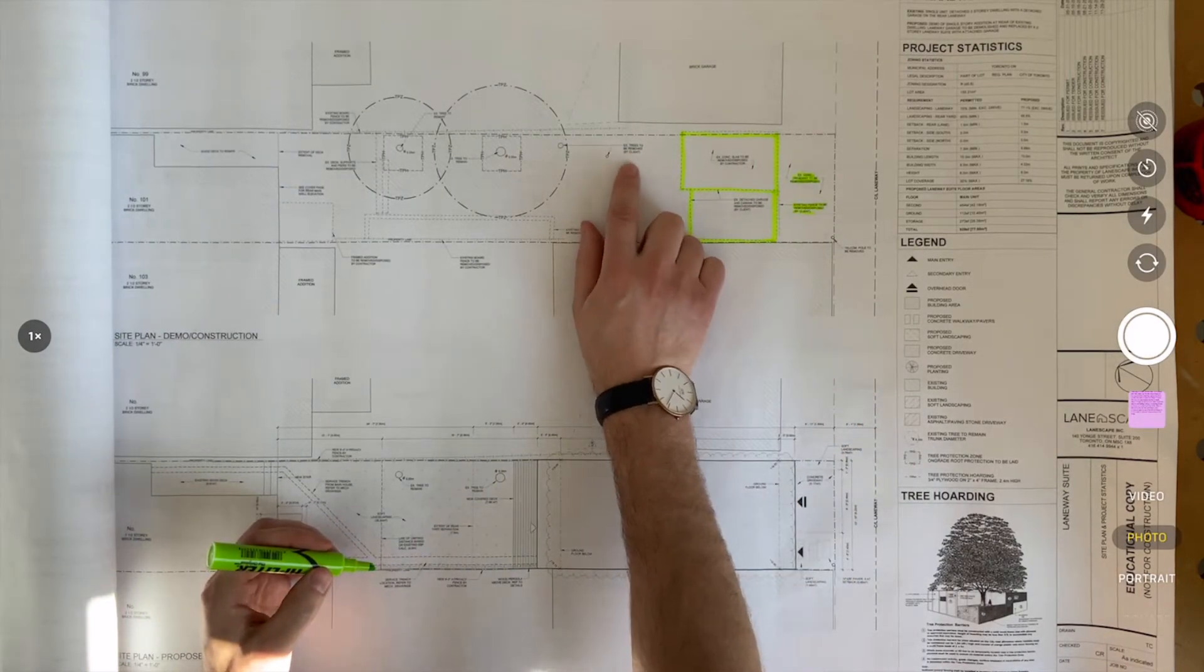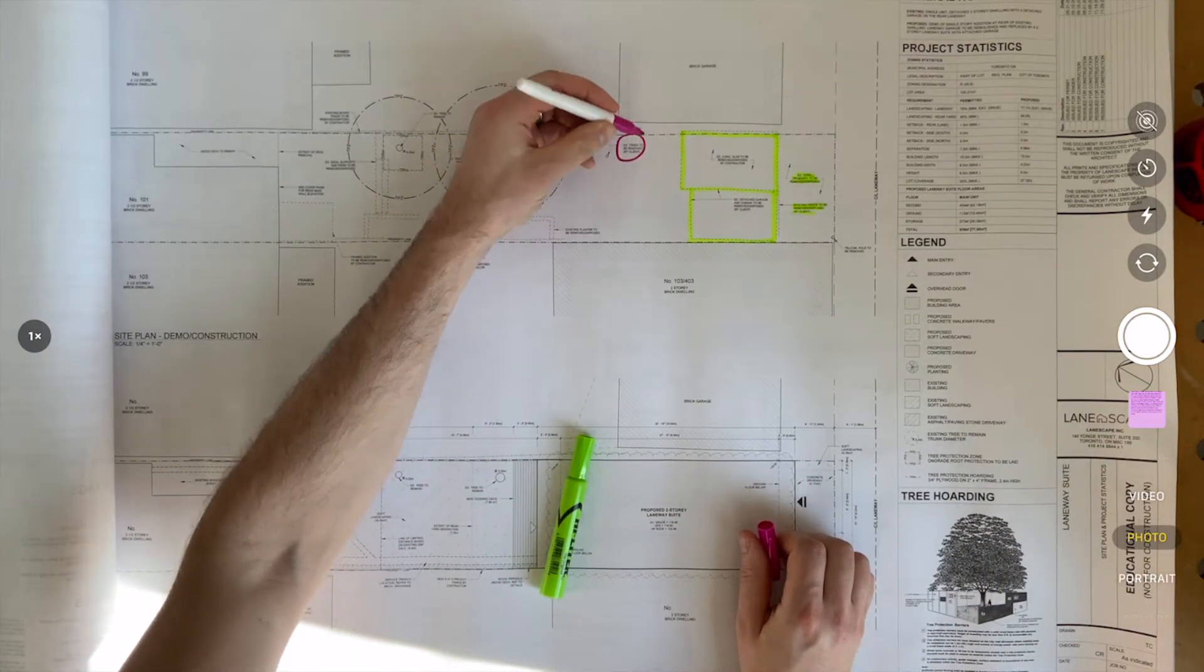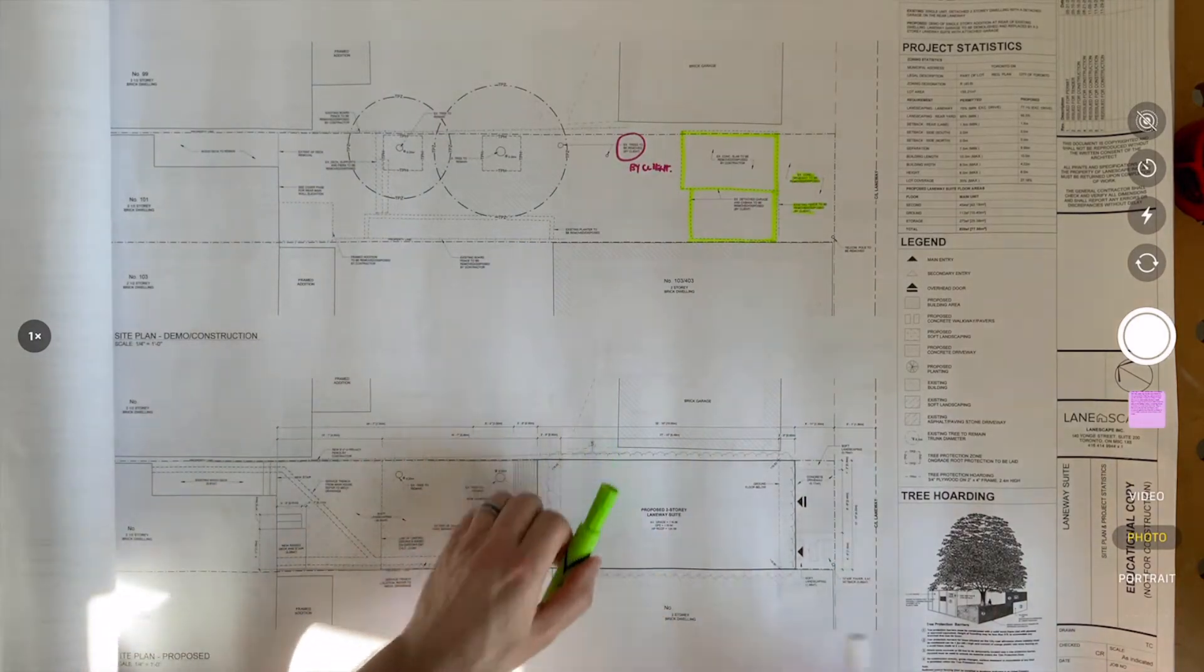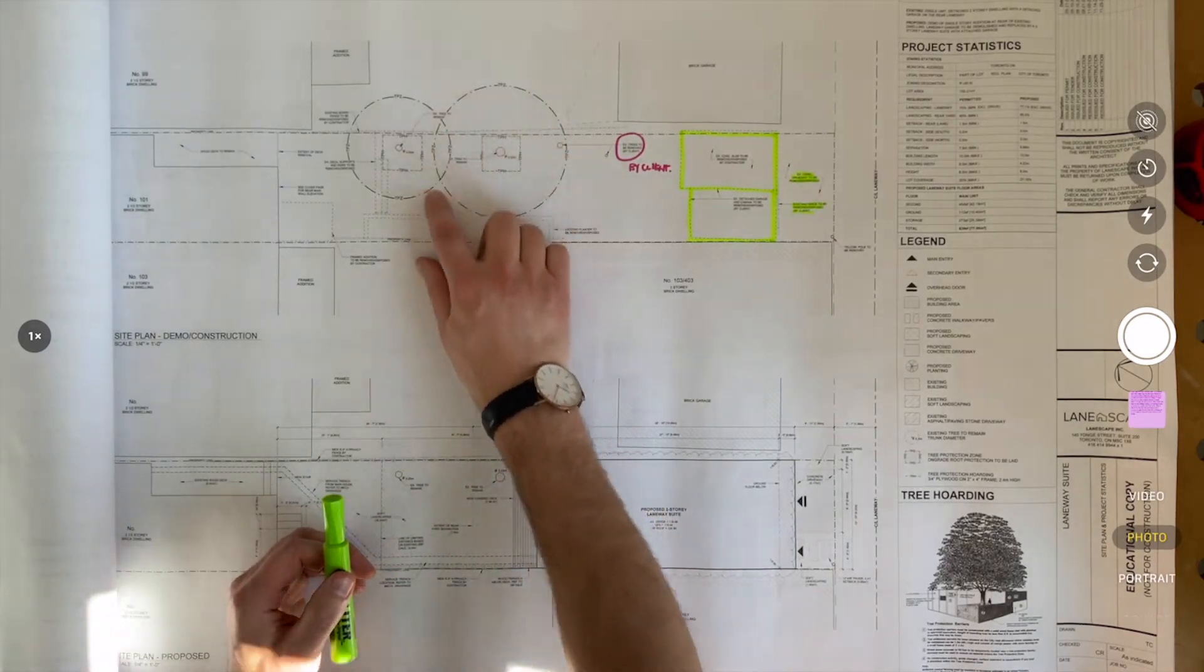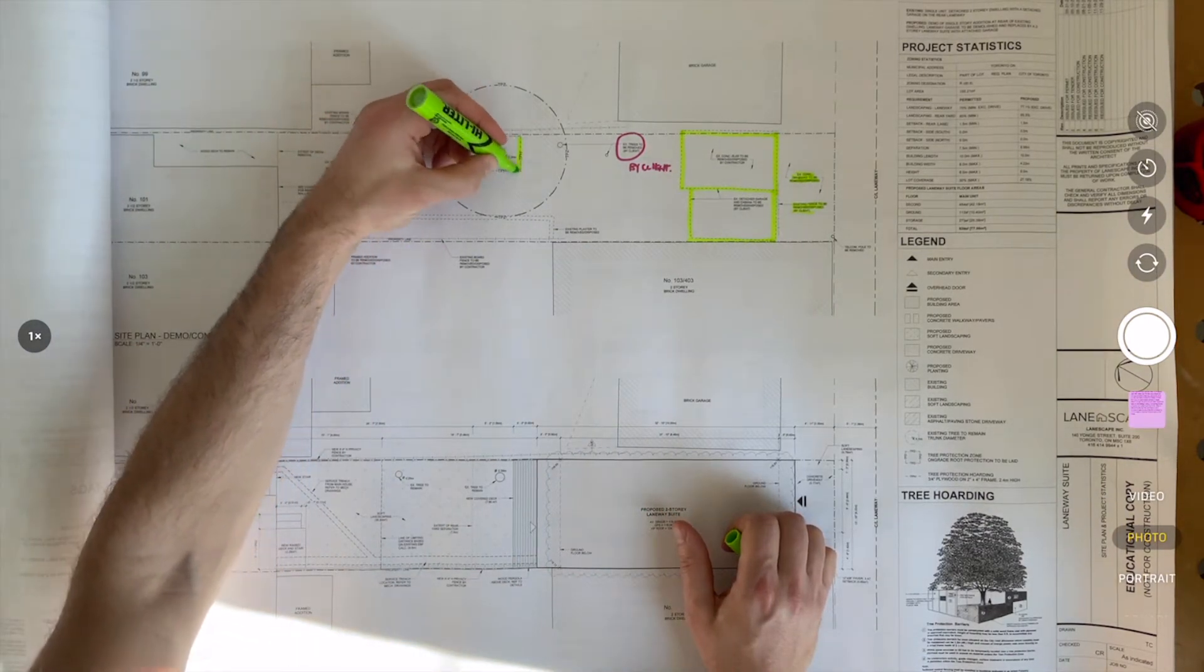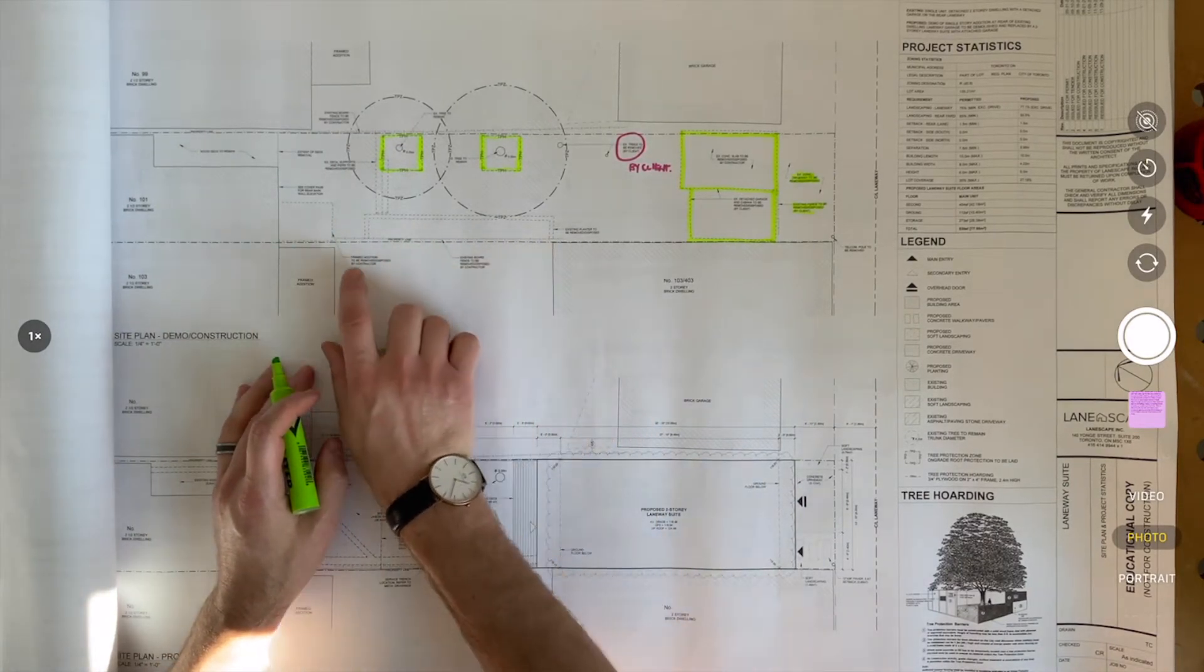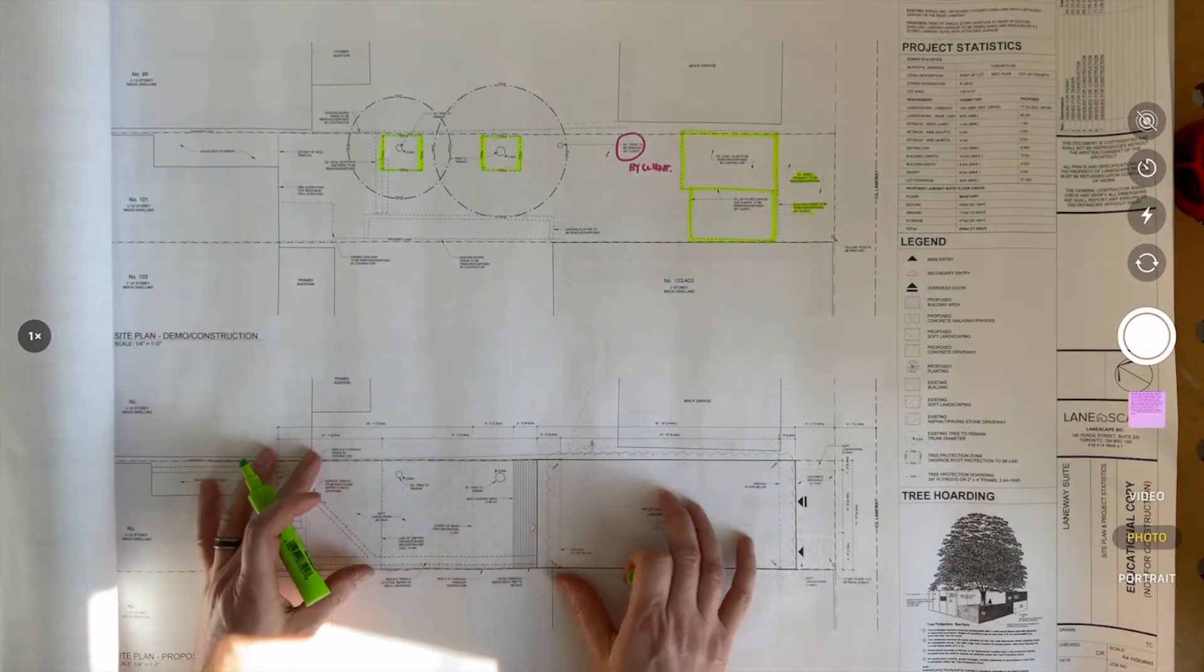Existing trees to be removed by client. So the client's going to do something. I might just circle that in my client color to say that is by client. So when I get to that piece in my scope for removal, I don't have to carry any costing or hours for that. Now crucial for Toronto is TPZ – tree protection zone – I have to build those. So that is going to be under my scope for site setup. I can highlight those. I've got two trees here. I need to do that. And I'll read all these notes. So read every single thing and highlight the things that are relevant to you. Let me do that while you watch me break down this plan, make my notes, and we'll finish things up here.